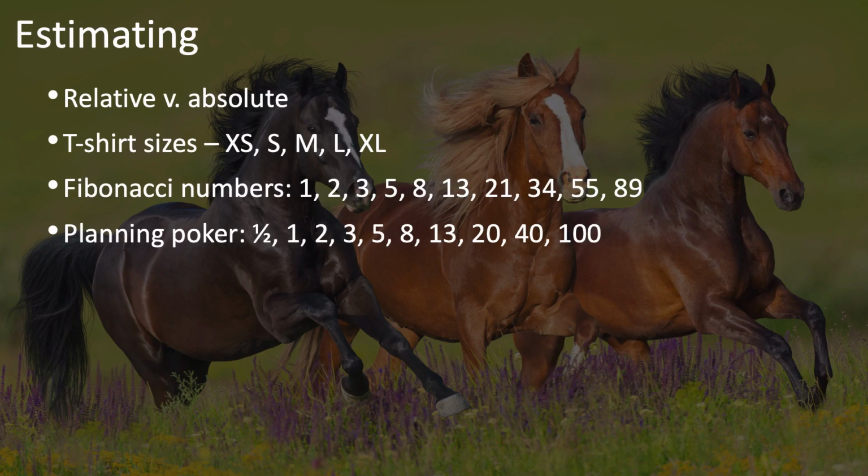You do this for the whole product backlog. Then, at the beginning of each sprint, during sprint planning, as you're selecting items from the product backlog to place onto the sprint backlog, you should review these estimates and update them as needed, using the same process, having the whole team participate. In a nutshell, that is the Scrum estimating process.